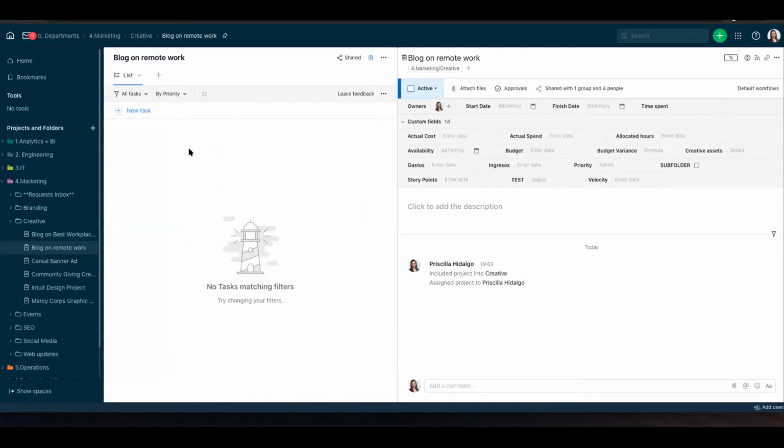Our trait number 1, all your projects need to be populated with tasks, and these tasks need to be not too general and not too specific. When the tasks are too general, it may cause confusion as we are missing clarity regarding what needs to be done. If tasks are too specific, we might end up redoubling efforts and losing track of what the main goal is.